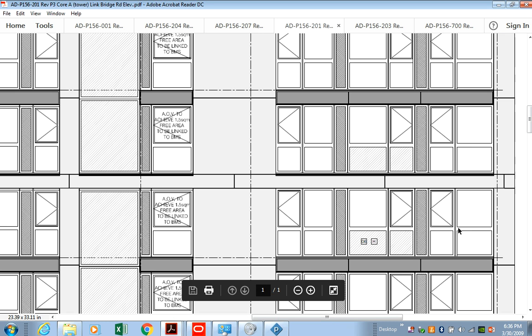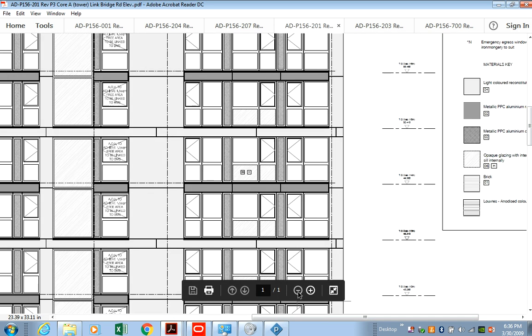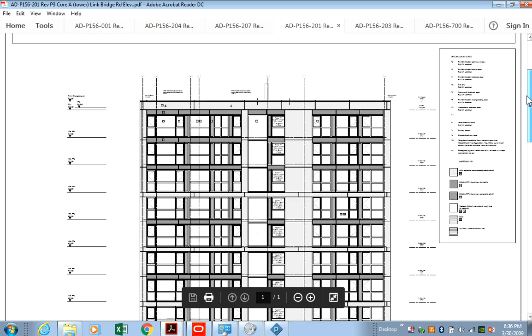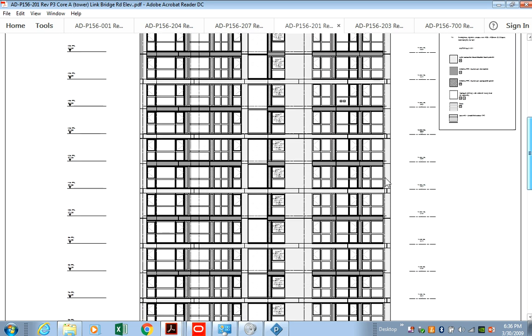So once you ascertain how long that would take, you know how many windows you have throughout the whole of that elevation, and then you calculate how many windows top down you have and multiply by the amount of time it takes to fit one window, and that will give you the time required to fit all of the windows.